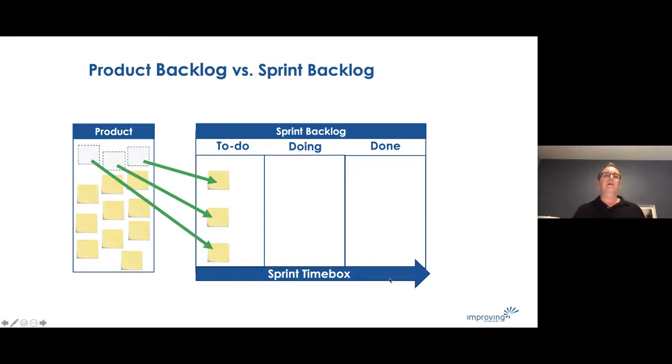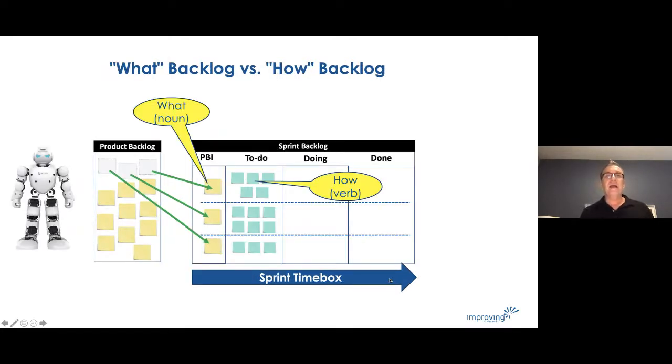So in a nutshell, if we build our product backlog, we depict those things over on the left-hand side here as these chunks. Think of them as nouns. The sprint backlog has a time frame of some time period less than a month. Most teams that I work with do 1 week or 2 week sprints. So the exercise is pulling items off the top of the product backlog into your sprint backlog, nouns once again, and those go into the front part of my sprint backlog. These are the things that I can build within that time frame. So tying in the vocabulary here, then I pull items from the product backlog into my 2 week sprint backlog.